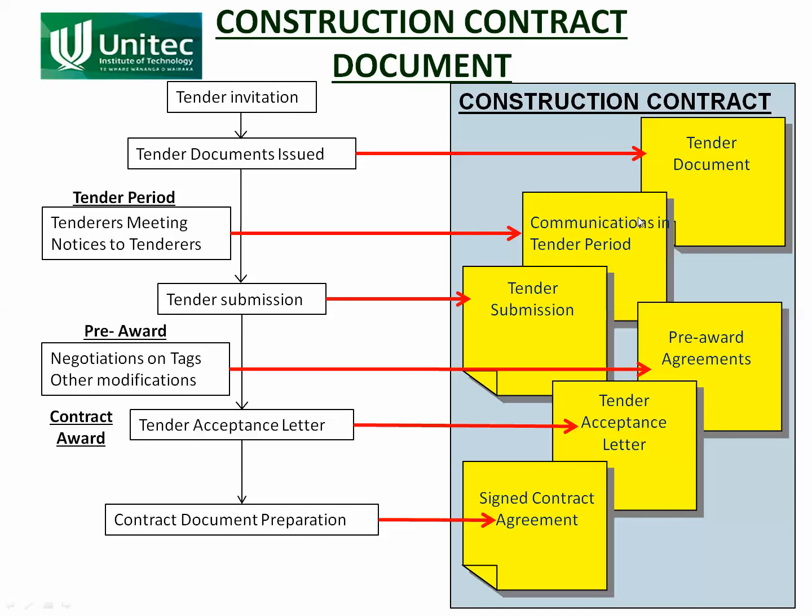and they become part of that tender contract agreement. They modify it. So it might have been that you specified a particular type of bolt or valve or something like that in the tender document, and then subsequently in discussions with tenderers you agreed to use a different one. So you modified what was in the tender document by those discussions.